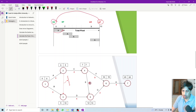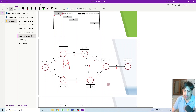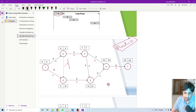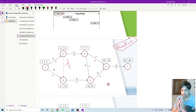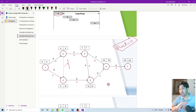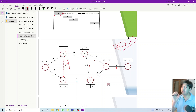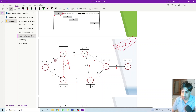Now we need to apply this formula to all activities in the network diagram to find the flexibility of each one. A critical activity is an activity that has zero float — it has no flexibility. This means any single day of delay will directly affect the whole project duration, unlike other activities that may have five, six, or seven days of flexibility.